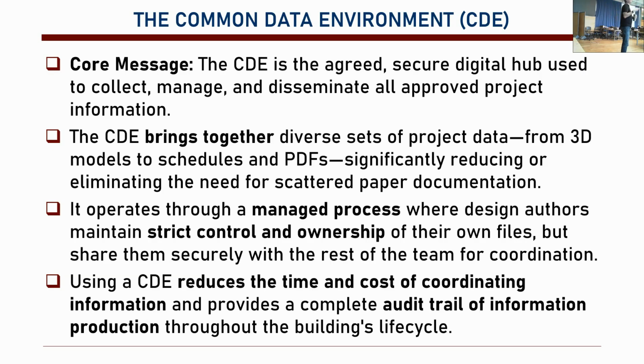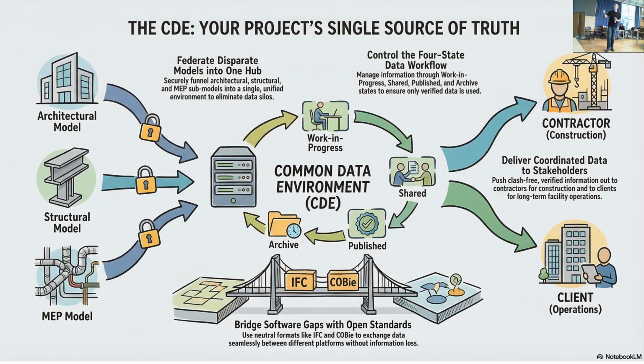Or you want to know when they did a change, okay? So we have an architectural model, we have a structural model, we have a mechanical, electrical, plumbing model, MEP. So it goes to the common data environment. First, it is work in progress, okay? Then it is shared. When it is shared, it's shared with all the people, the contractor, the client, okay?